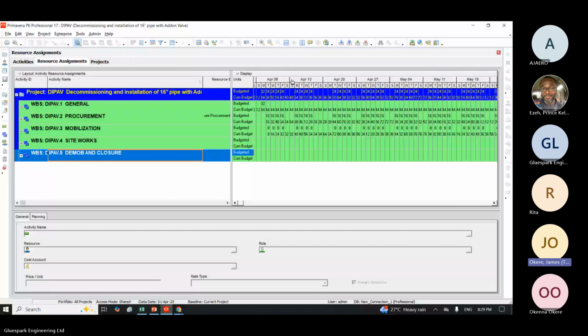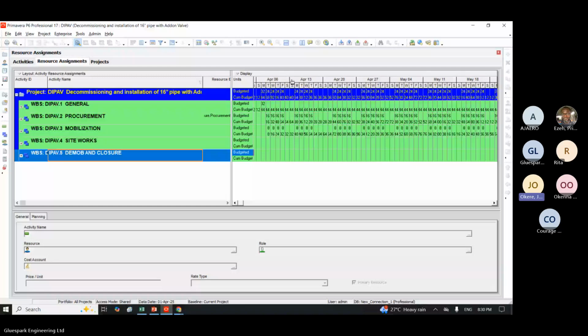Then if it's a project that will last 3 years and above, sometimes 5 years and above, we suggest monthly reports. But some companies will always insist you give them weekly reports, okay? Any project that will last from 6 months and above, we don't encourage daily report anymore. It's stressful and time consuming. So just take that as a benchmark for yourself, but align with your project manager to know what the stakeholders will actually need for the project. In this case, we want to do a weekly report, okay?